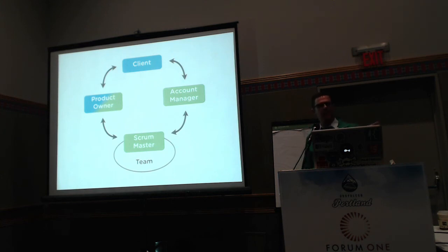In Scrum, at the beginning of every sprint, you're supposed to say what everybody's availability is for this sprint, right? This person's out half a week on vacation, or I'm going to be gone the entire time, or whatever it is, and you have a plan for that. So you're going to have to decrease your anticipated velocity based on the number of people who are actually available. We have to do the same thing about people being split on projects. Whenever possible, though, we want people to be fully dedicated to a project.